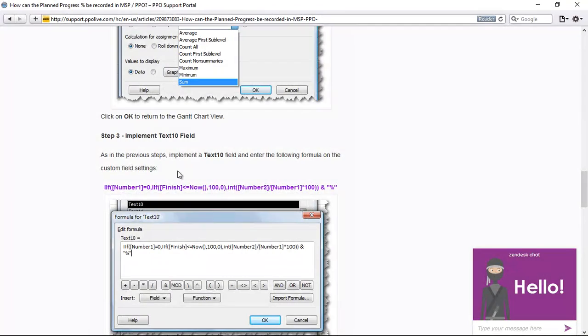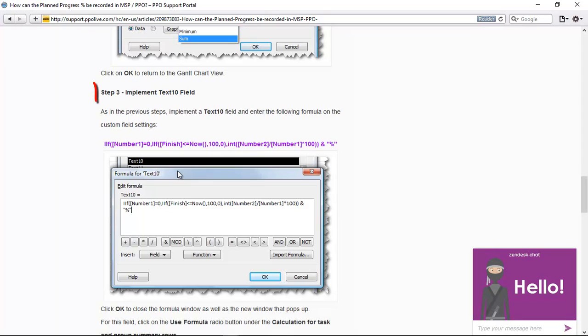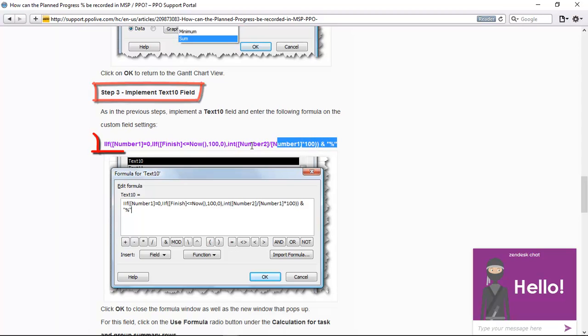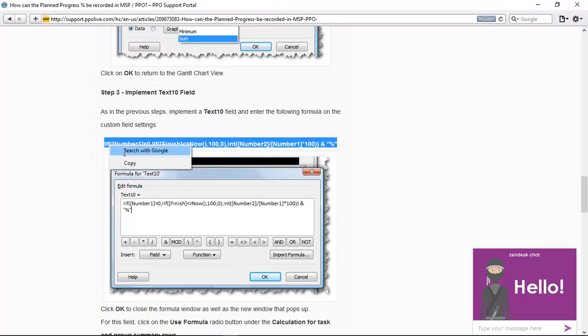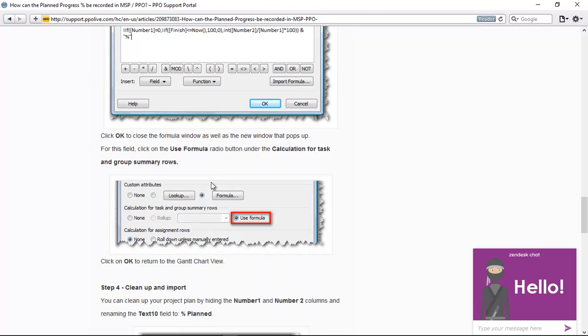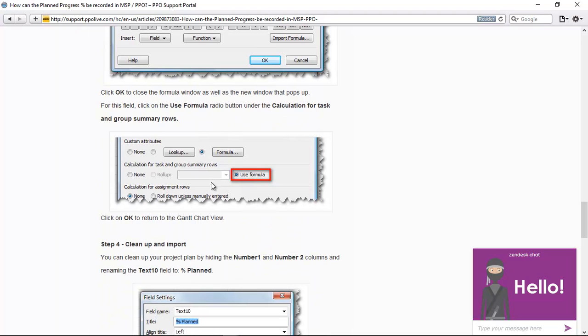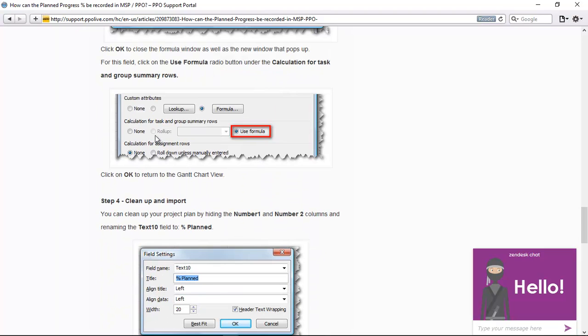So here at the bottom, the last step that we now need to do is to implement the text 10 field. So I'm going to copy this formula again, and then the one different thing that I'm going to do with this last step is I'm not going to choose the roll up option. I'm going to choose the option that says use formula. So let's go back to the schedule.